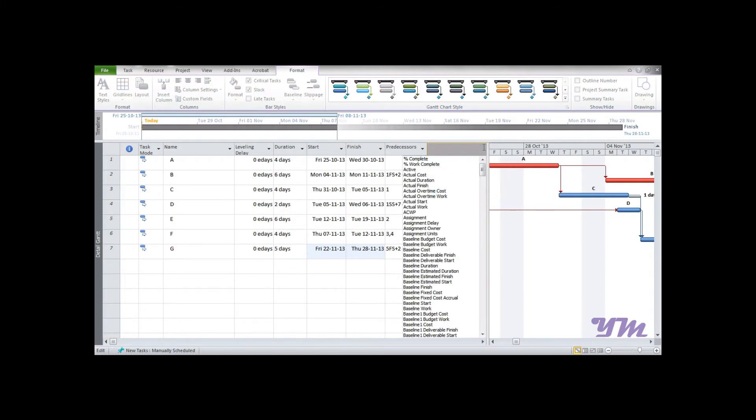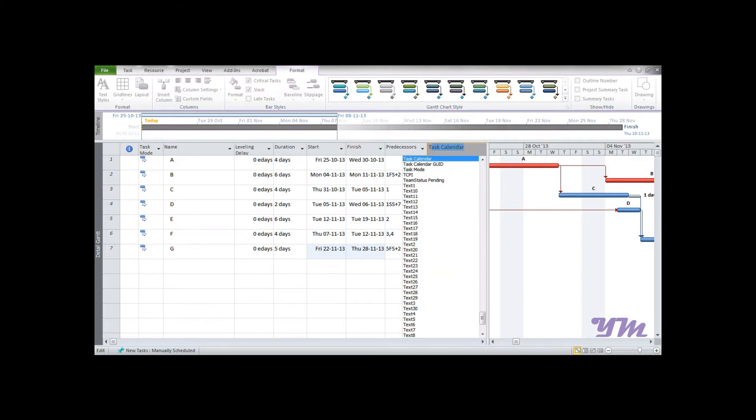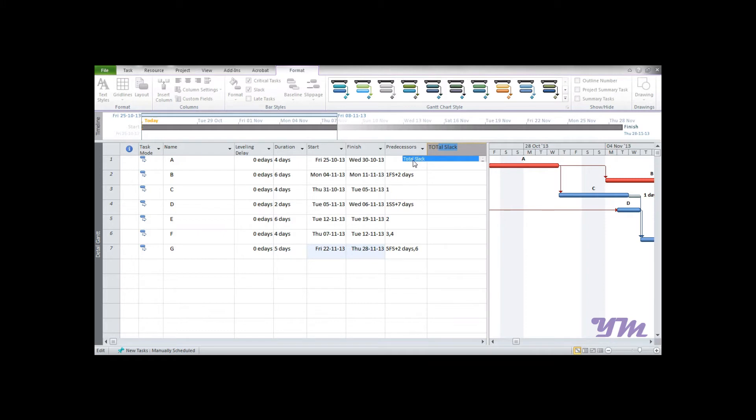If you want to know the total slack, you can just write 'T-O-T'. Here it is: Total Slack. Just need to select Total Slack, and it would display the total slack values in this column.